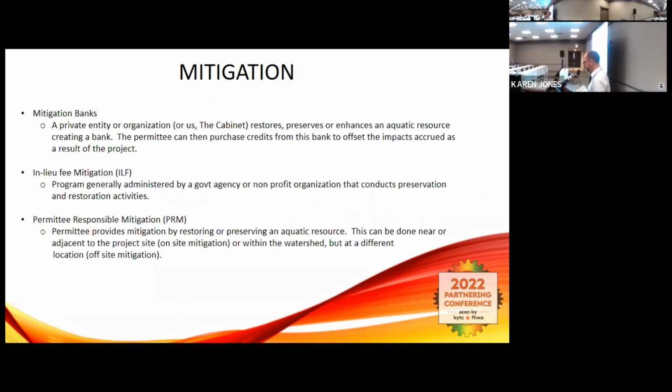Developers, coal, solar, wind, pipeline construction, anyone that's going to be needing an Army Corps permit that requires mitigation is looking for bank opportunities. So what we're left with is a bank depletion. We've pretty much run down a lot of the credits in certain service areas and have left us in a tight spot on constructing roads and using the mitigation bank.